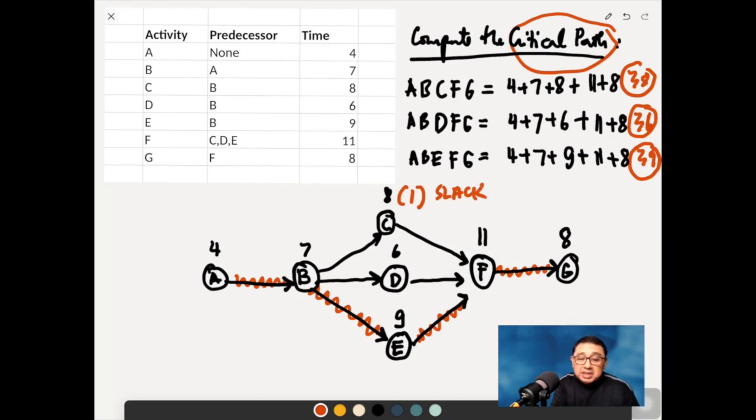And then A, B, D, F, G. There's 36 here. So for this one, there's an allowance or a slack of 3. Meaning, the project manager here can actually allow for some slippages in activities C and D.